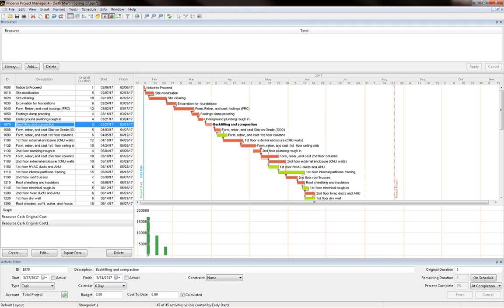So the solution in this case is for me to create a subschedule from the master schedule. Does that mean that for each one of these different subcontractors I'm going to create a new schedule? Again, that would be a waste of time. But if you develop your schedule correctly the first time, we are going to add tags to certain activities, or we are going to create filters through which we're going to pull all the activities and then set criteria for the opening of that filter, which activities can pass through and which activities are going to be withheld.